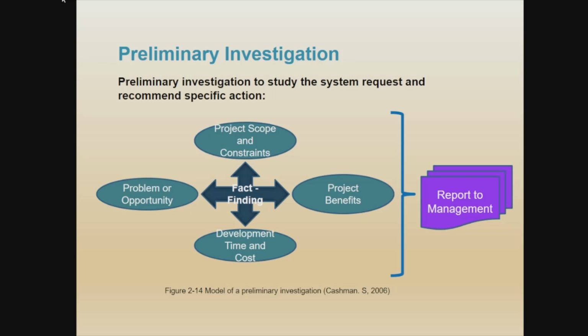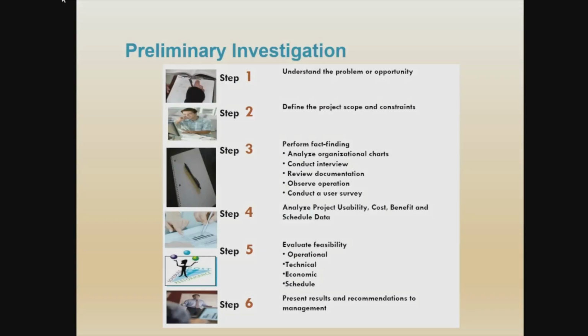And then you need to estimate the time of development and the cost involved in order to develop the information system. When you do the fact finding, you can make a report to the management. Based on the preliminary investigation, you can make a decision either to proceed or to reject that project. Okay, that is the importance of the preliminary investigation. These are the steps. The first objective of this topic is that we want to know the steps.